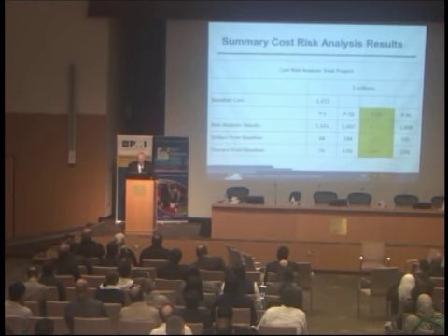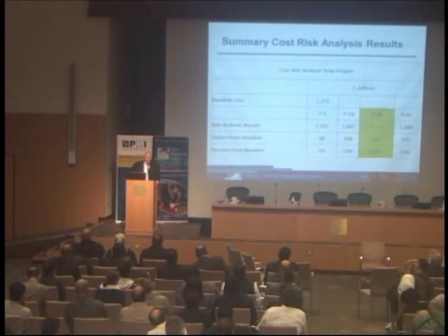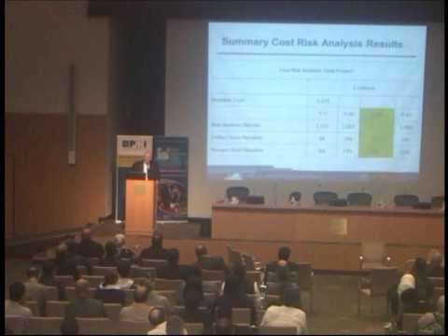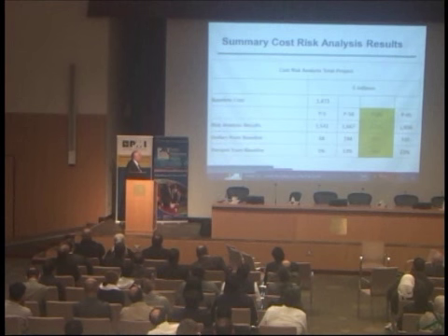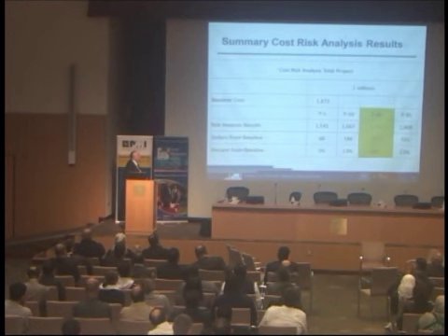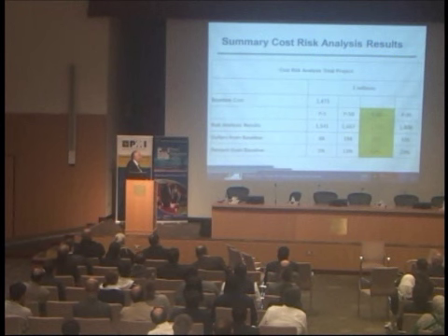Summary cost risk results. Okay, now all of a sudden I'm going to get cost risk results, but now you know that because it's an integrated cost and schedule risk analysis, these cost risk results have the impact of schedule risk embedded in them. Okay, and it turns out that at the 80th percentile, I'm recommending $263 million, which is an 18% increase over 1.473. In other words, 1.736.